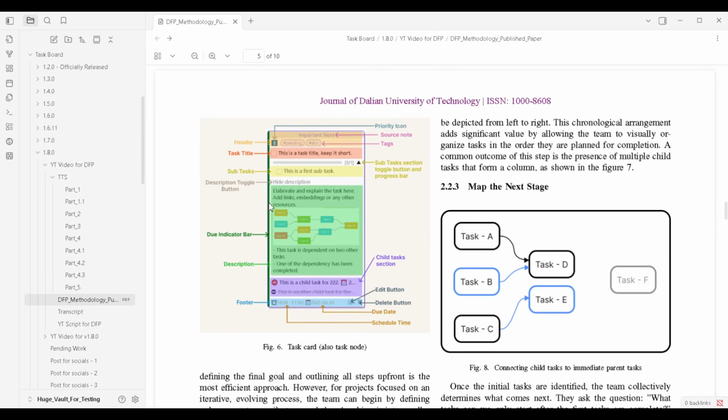Here, as you may see, there is a color indicator on the left side, which changes its color based on the due date. If the task is overdue, then this color will be red. If it's an upcoming task, then it will be green, and if it's scheduled for today, then it will be yellow. Also, the whole card background color can be changed based on the domain of the project this task belongs to. For example, if the task is about marketing or production or development, the background color of the task will be different, just like in Kanban methodology. With time, the UI of the task cards can be enhanced as and when required, but the main idea is to show the critical information as efficiently as possible.